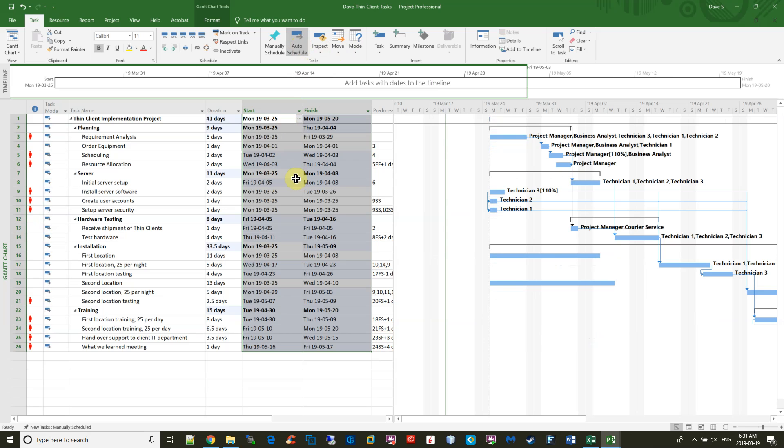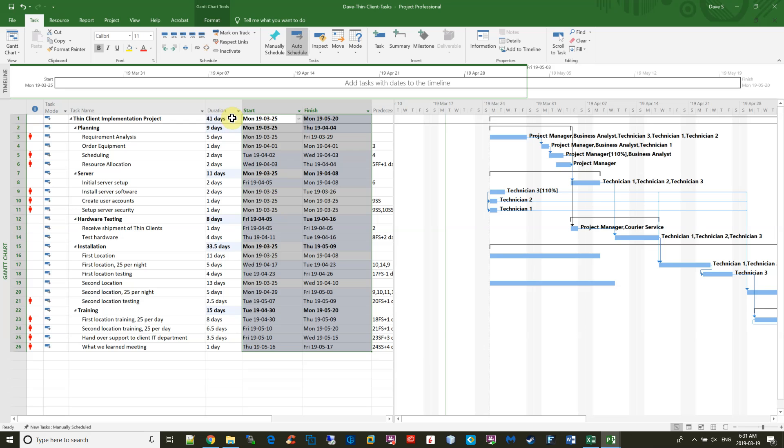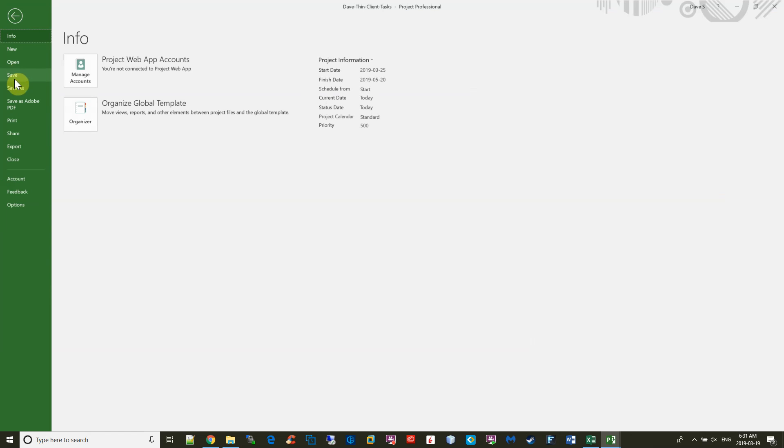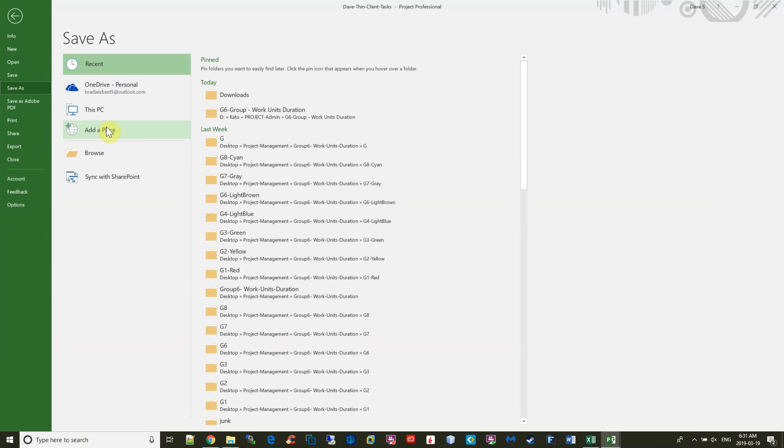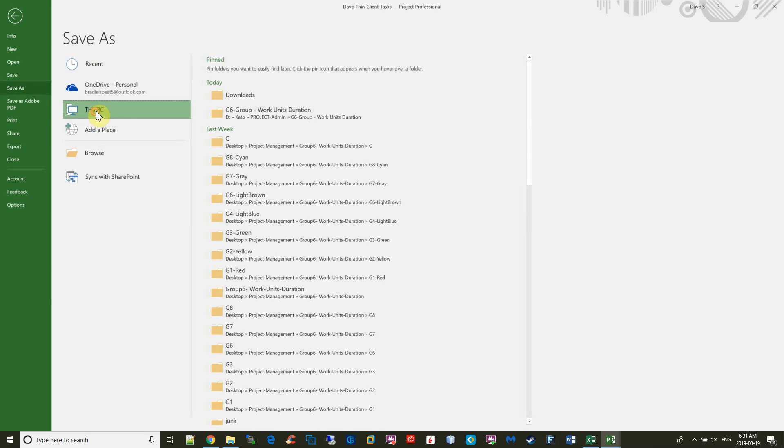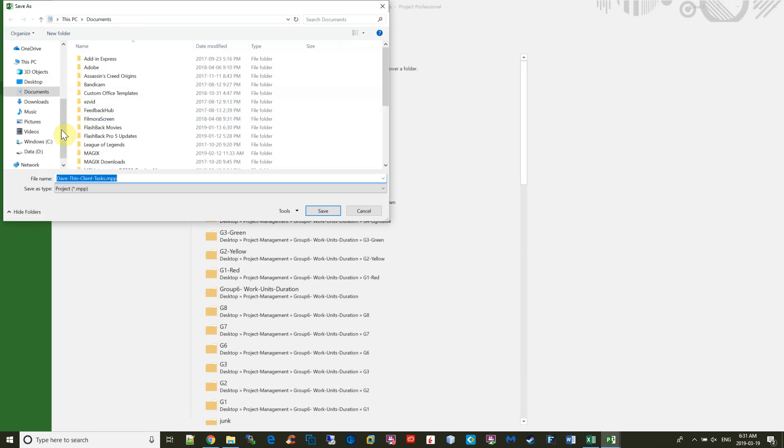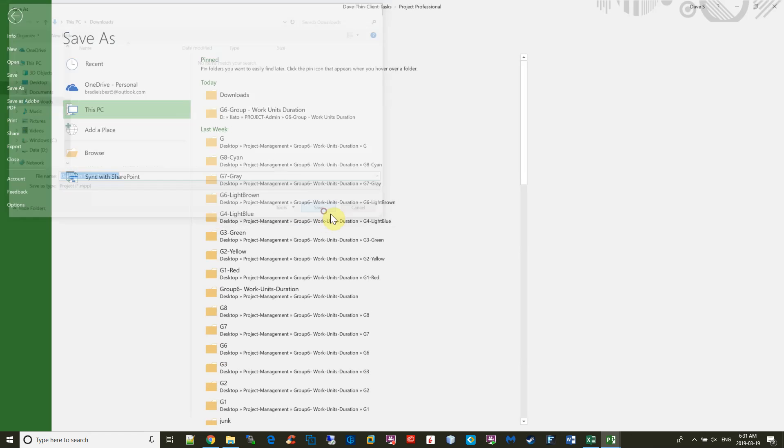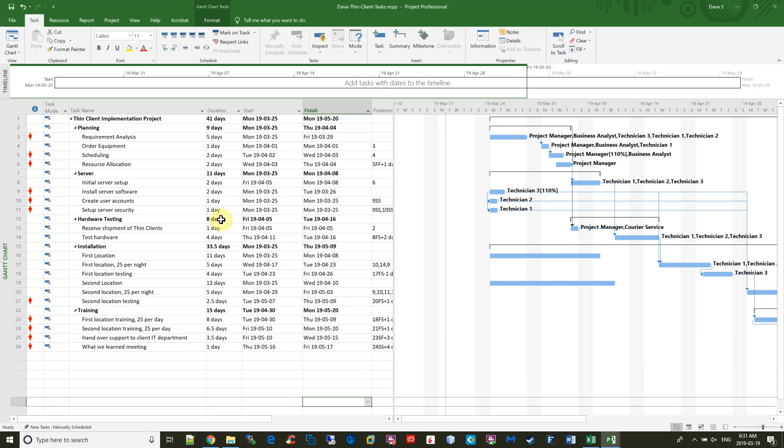And if I take a look, things look okay. The reason the Excel spreadsheet had 51 days and this spreadsheet has 41 days is because weekends were included in this spreadsheet, and Microsoft Office has weekends excluded. The next step is I'm going to save this. I'm working in the downloads directory, so I'll just save it with the same name, and I'm ready to go on to the next step.